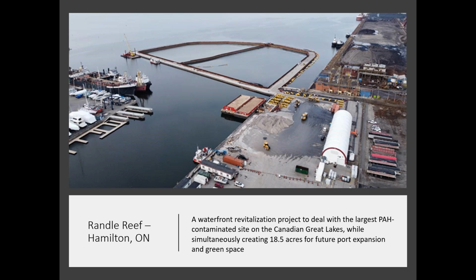This project included the design of a remediation plan that included construction of the 6.2 hectare engineered containment facility over the highly contaminated sediment, and then using a combination of hydraulic and mechanical dredging to remove approximately 445,000 cubic meters of contaminated sediment and placing it within the ECF.